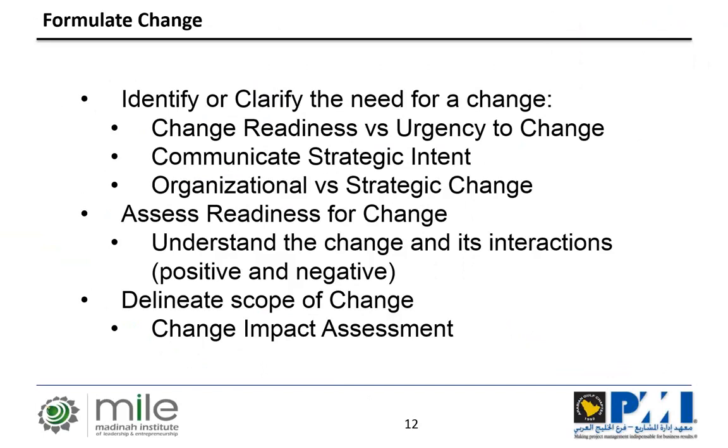Now, on the topic of assessing readiness, this is probably one of the most complex areas, especially when we're trying to formulate a change. Because typically we are in an early stage and we don't necessarily understand everything that is going to happen. So what it means is that we need to understand clearly the change and its interactions. How is the change going to affect the relationship between our different business components? How is it going to affect the relationship with our clients? How is it going to change the relationship with our suppliers? And those interactions have to be qualified as either positive or negative. The reality is that in many cases we have both. We always think that change should be positive, but the reality is that in many cases change also drives negative aspects, and therefore we have to be aware of those when we are assessing the readiness for the change.